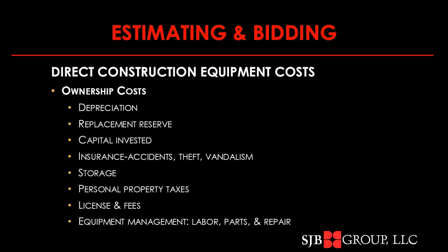Drilling down on the ownership costs, we have the depreciation, which most closely maps to the rent. If you own this particular piece of equipment and you're determining the ownership cost, you're also going to want to consider use of a replacement reserve. That means a certain amount of money that you set aside as you put this piece of equipment on a job, to get paid for by that particular project, to hold that money in reserve for the eventual purchase of a replacement piece of equipment.